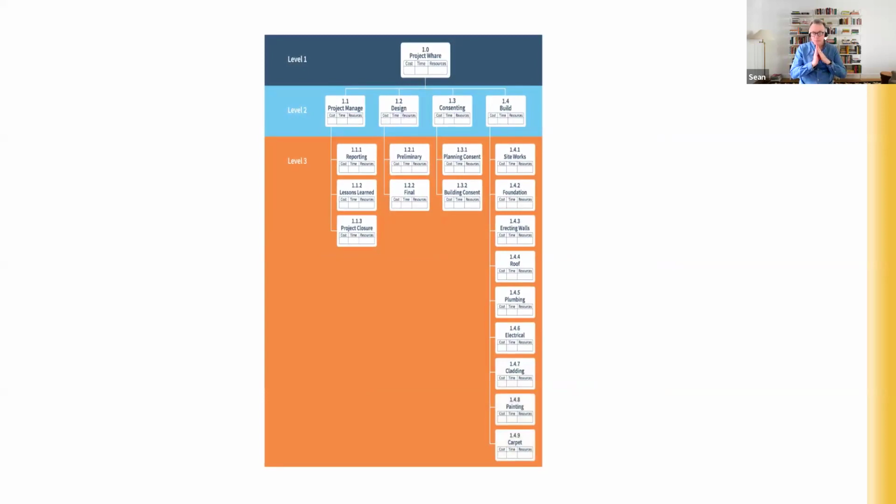If we wanted to go into one more level, that would be the activities level, and obviously it's getting down into quite a lot of detail. Most work breakdown structures will go to at least 3 levels, the work package level. Definitely go to the activity level for parts of the scope that you are certain about. And you may want to go one further level, to task level, although you would have to weigh up the benefits of getting this detailed against the time and effort taken to do it.